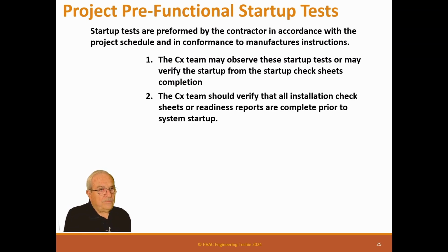And the reason is, I've done a lot of hands-on stuff in my life, and I can certainly start up a piece of equipment, but it's not my piece of equipment, it's not my job. And I don't bring a lot of expertise. If a manufacturer's rep is there starting it up, he should know 100 times more about that machine than I know. So I don't have to be there. I'm not going to bring anything to the party. I don't add any value. And I don't need to be there for anything where I don't add value. Now, if he does something wrong during startup, we'll figure it out later. A functional test will bring that to light right away.